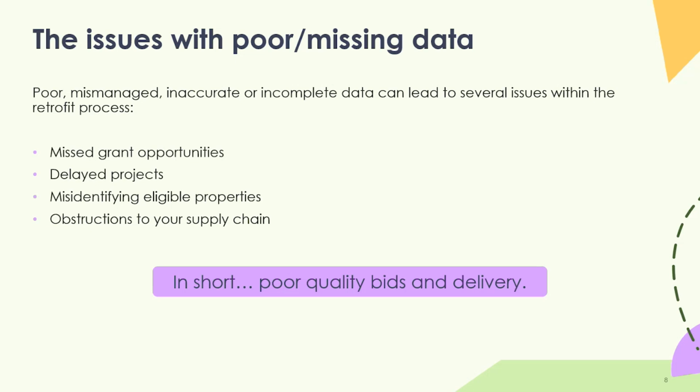It can lead to delayed projects because you might need to spend longer recollating data in a more accurate manner. Particularly, this is a classic thing of when you get out on site and all your EPC data was rubbish, and you've got to resurvey, find new homes, adjust delivery plans. It's frustrating for contractors. It's frustrating for project managers. It's just a horrible problem that can afflict your project.